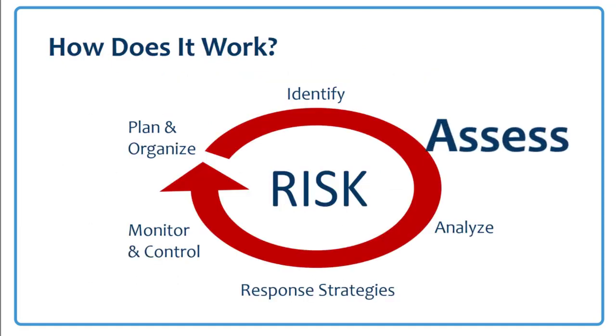All right, the next step is to assess the risks. As mentioned earlier, this is where you estimate the probability or the uncertainty of occurrence and the potential impact of each risk. This involves refining the risk statement and determining the affected components and activities, triggers and indications, related risks, again, the likelihood of occurring and the impact, as well as the resultant cost and schedule risks.